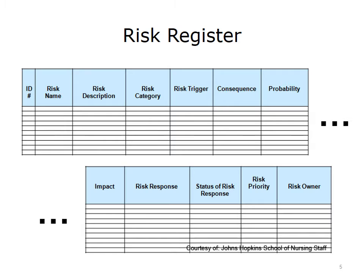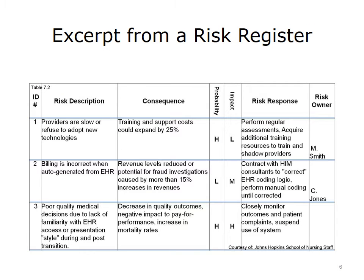You will document and track your identified risks in a risk register. Some of the categories in a typical risk register might include description, category, trigger, consequence, and probability. A key category is the risk owner — the person assigned to monitor that particular risk and implement the risk response strategy. This example shows some typical entries that you would find in a risk register.